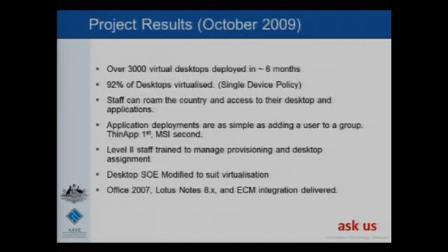The results, so by about October, 10 months later, we had successfully delivered 3,000 desktops. Within about 6 months, we'd only been given 2 months from the start of the project to deliver a pilot group. I said, that's not enough. No way. Especially when the login script still referred to a Banyan Vines migration that occurred 10 years ago.